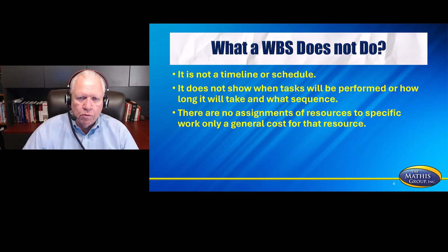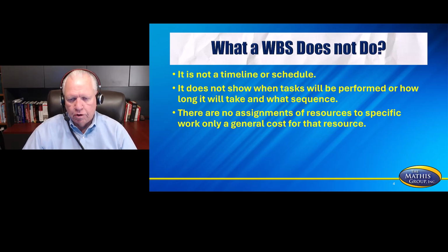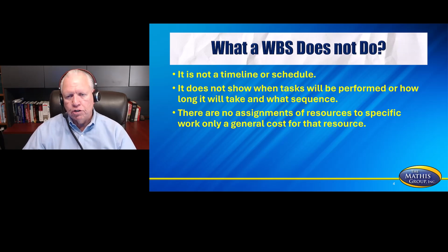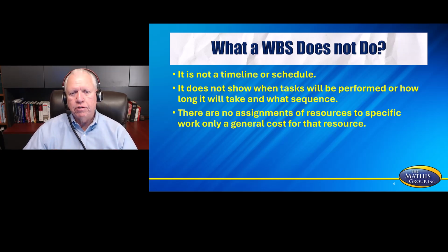So what a WBS does not do. This will trip you up if you're not used to working with work breakdown structures. It's not a timeline. It's not a schedule. This is a structure that gives you your initial estimates of your project. And then after you look at risk and other things, you massage those estimates until you finally come out with the real budget and the real duration for your project.